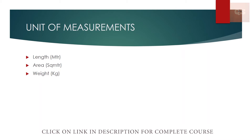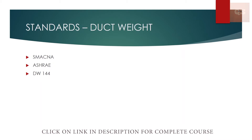It will depend on the specification and standard measurement used in the project, as mentioned in the BOQ. To find the weight of the duct, there are different standards like SMACNA standards, ASHRAE standards, and DW 144 standards. Based on the standard specified in the project, we can measure the weight of the ducts.